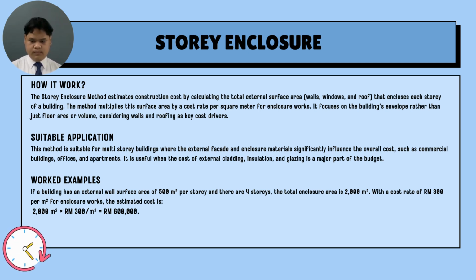This method is suitable for multi-storey buildings where the external facade and enclosure material significantly influence the overall cost, such as commercial buildings, offices and apartments. It is useful when the cost of external cladding, insulation and glazing is a major part of the budget.